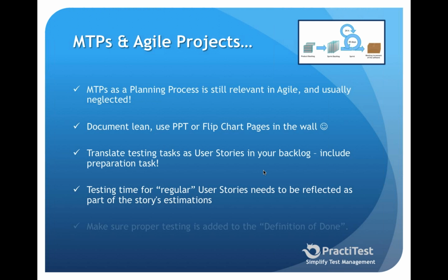If we're talking about the regular, quote-unquote, functional user stories, a big mistake, mostly for teams starting, is that they think they need to estimate only the time it takes to write the user story, maybe to make the unit testing, but you need to have your testing estimates there also. If you don't have testing in there, then you're going to run into problems because you won't have time to test.